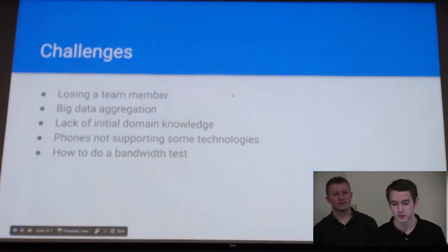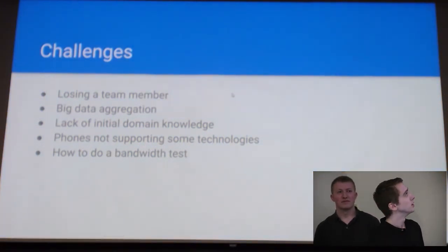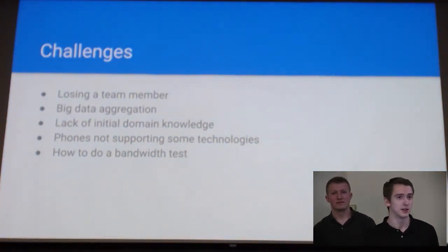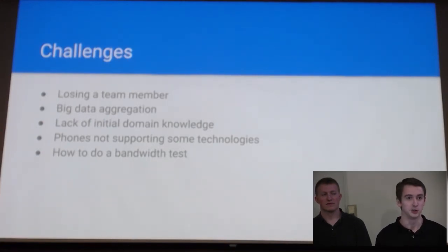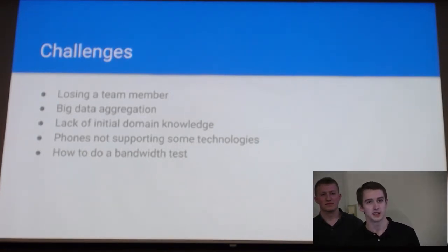Some of our challenges this semester, or during this project, were losing a team member. Originally, we had slated a lot of the visualization and the GUI to our fourth team member, but after losing him, we negotiated with our sponsor, and originally we weren't going to do anything with the visualization, but he wanted to be able, towards the end of the semester, to start getting funding for the app. So we took on that extra work and got something to show for it.